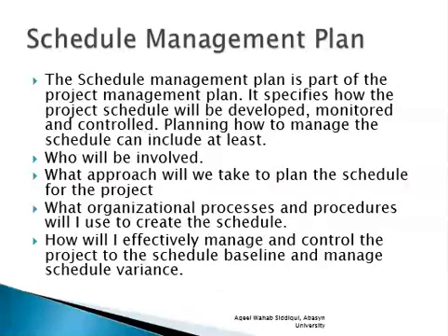It specifies how the project schedule will be developed, monitored and controlled. Planning how to manage the schedule can include at least who will be involved, what approach we will take to plan the schedule for the project, what organizational processes and procedures I will use to create a schedule, and how I will effectively manage and control the schedule to the schedule baseline and manage schedule variances.